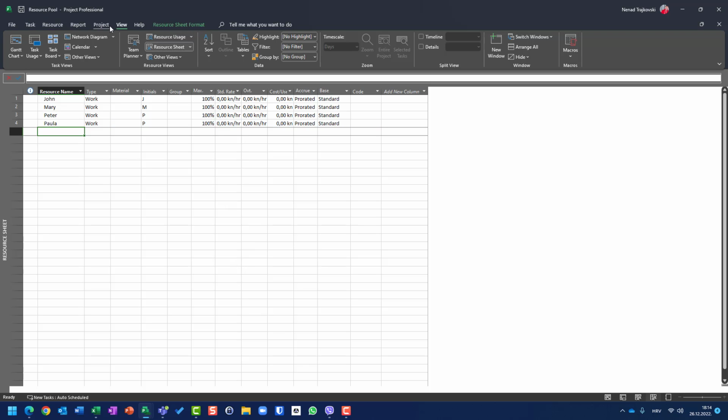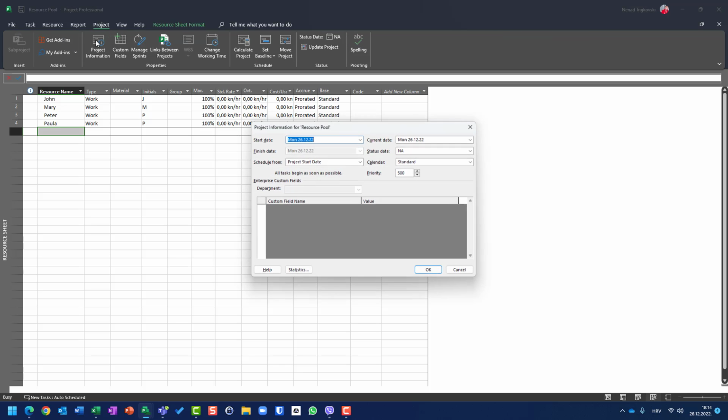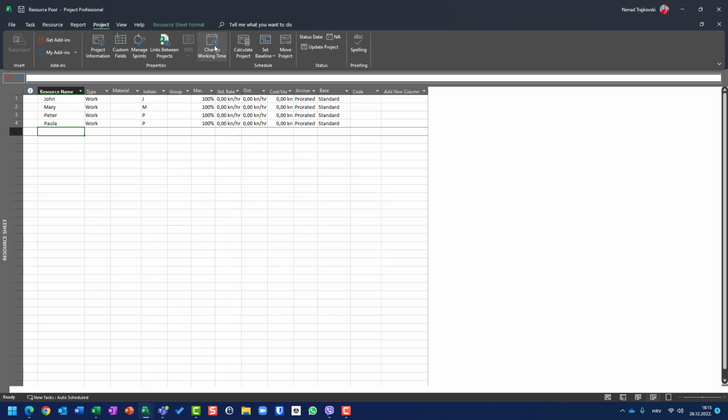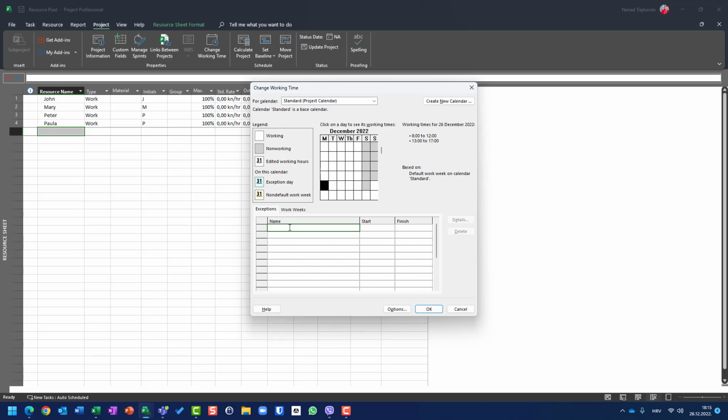Now I'm going to Project, and I will say Project Information, I will say Change Working Time, and I will say holiday on 25th of December. Okay?